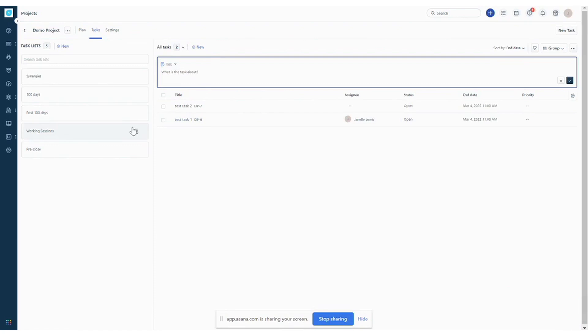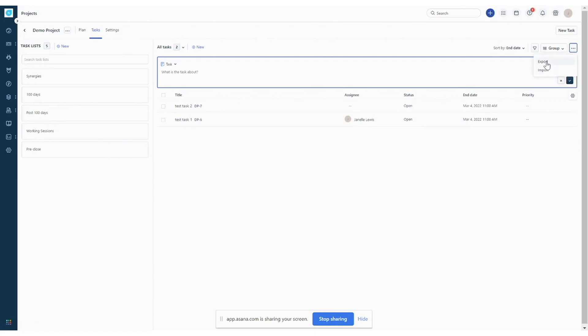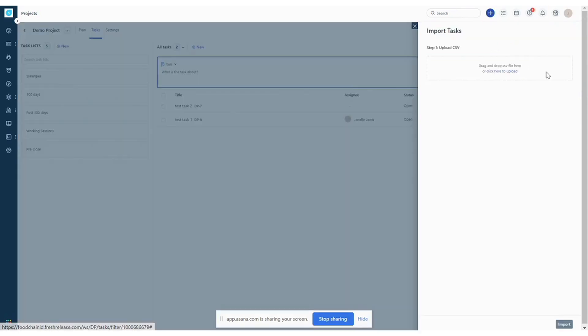If you don't want to start by just adding in tasks, let's say you already have a task list that exists in an Excel document, you can also import tasks right into FreshService. So to do that, you'll go to the right hand corner and choose these three dots and choose import. It's also important to note that if you want to ever go back to an Excel document, you can export your plan. So let's hit import.